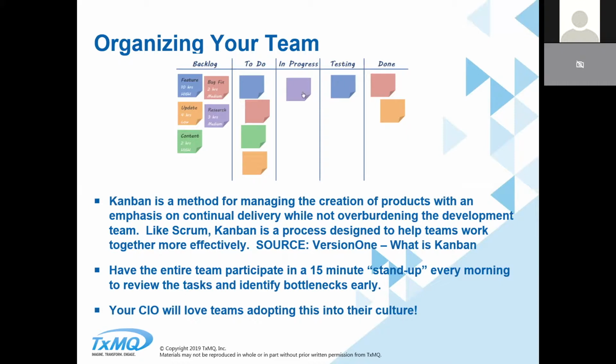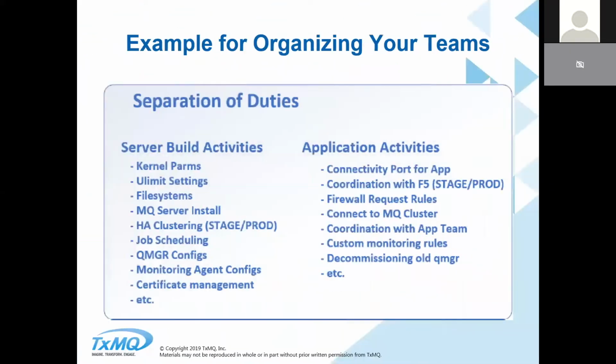And then after your 15 minutes, you state: this is what I did yesterday, this is what I'm doing today, here's my impediment. Anything that requires further discussion would be after the 15-minute stand-up, because that's really important as well. So people within the team can hear what other people are working on, because if someone's having a problem, or someone is working on something that someone else has a little knowledge of, that's where team members can raise their hands and say, hey, I can give you a hand there if you need it.